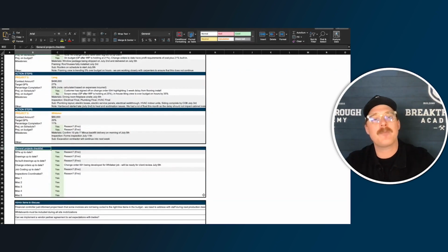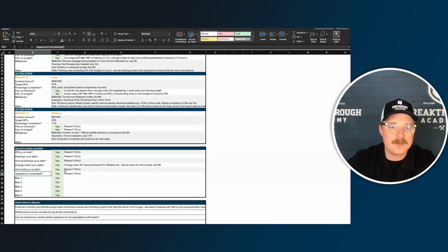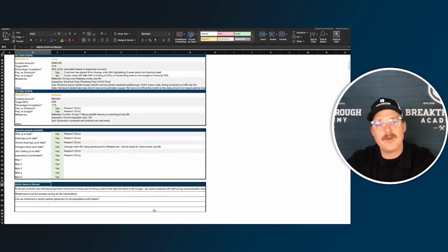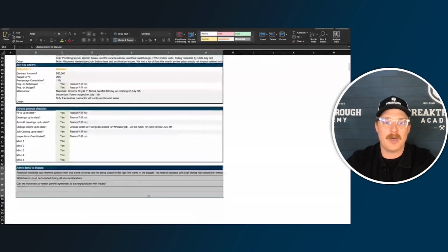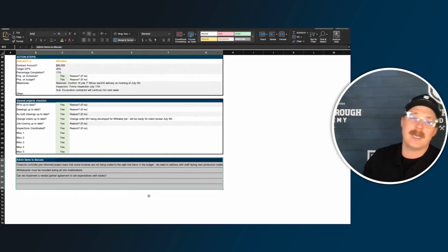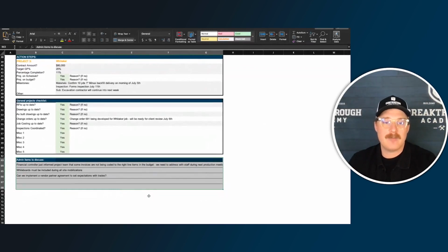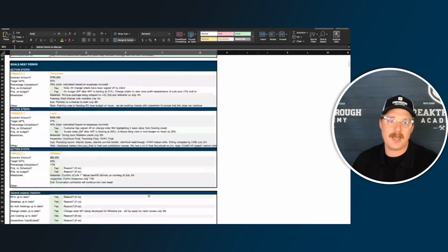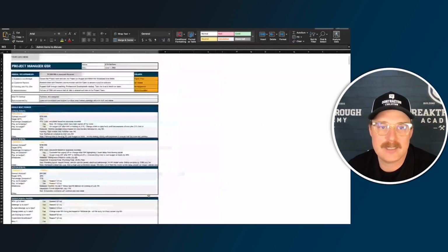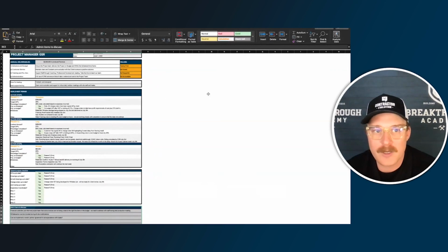There is a general projects checklist that you would run through. Are the RFIs up to date? Are drawings up to date? Right? Is job costing up to date? Like, do we have numbers on this project? Are inspections coordinated? Right? You'd go through this, and then there'd be admin items at the bottom. So these admin items are going to be, hey, the financial controller just informed me that the project team sent some invoices that are not being coded to the right line items. Can we clean that up a bit? Hey, we need to get whiteboards included on all sites during mobilizations because we want to draw diagrams and communicate better. These are just like loose ends that you need to discuss. And so this dashboard, right, it's getting filled out on a Friday and it's getting met on a Monday.